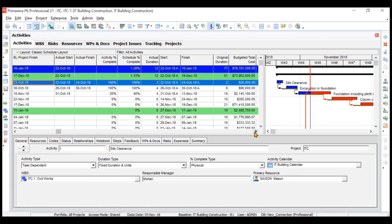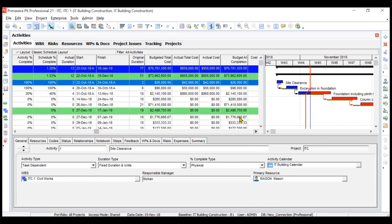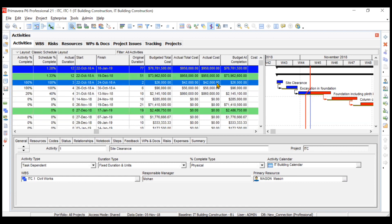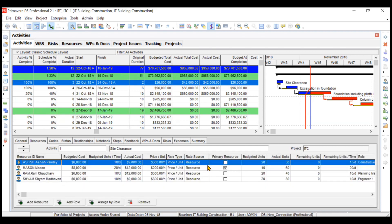You can see that your actual cost is coming as $42,000, which is calculated based on your resources cost of LMP. If you go to the resources and see the actual cost—Ashish Pandey, Mason, Ram Chaudhary, and Sham Madhwan—when you add this actual cost it comes to $42,000.